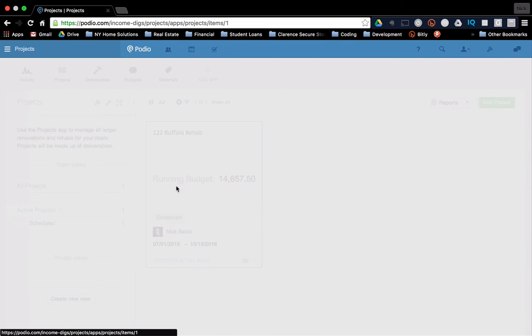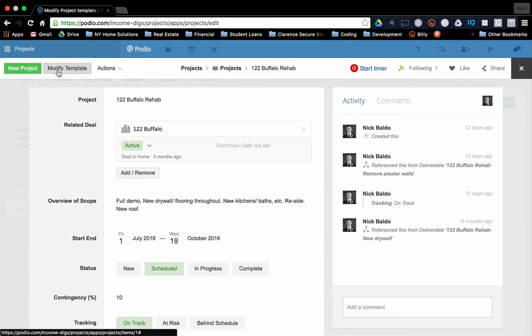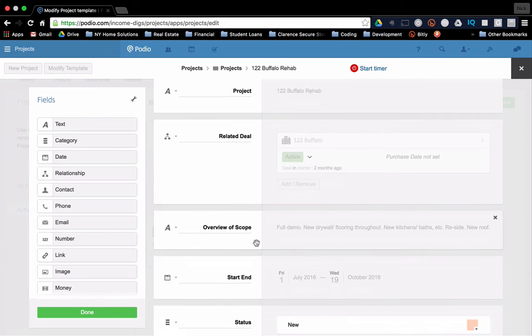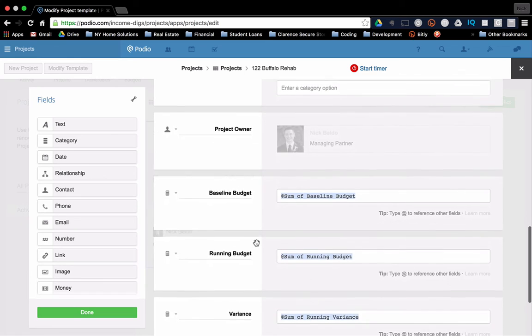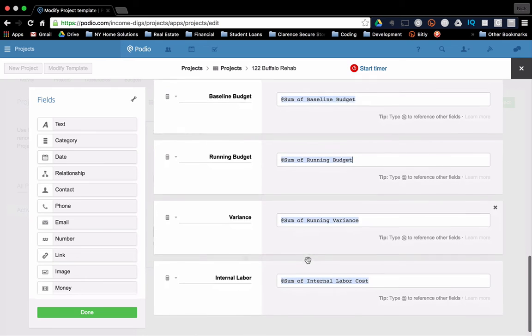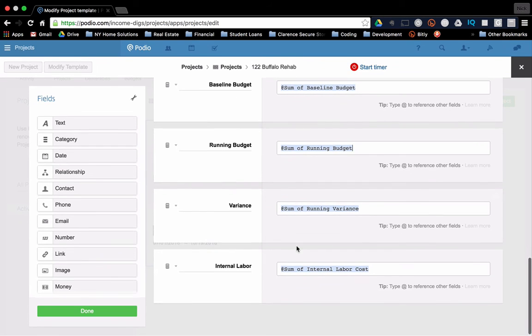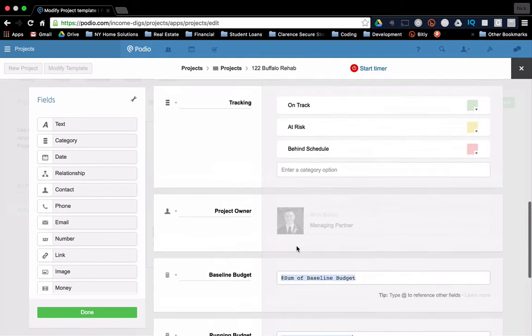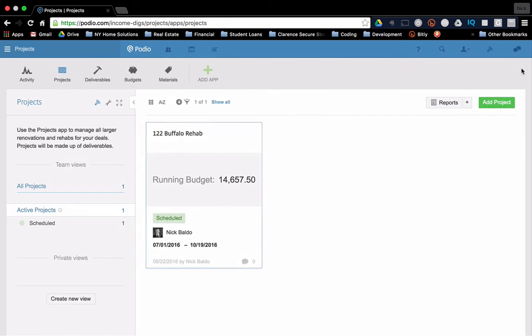So this is really pretty awesome. So if I go into modify, you'll see some of these calculations. Baseline budget is just a sum. All these are very simple. Just go and grab from those things that are related. Okay. So at high level, that's how it works. The deliverables roll up to the projects. Okay.